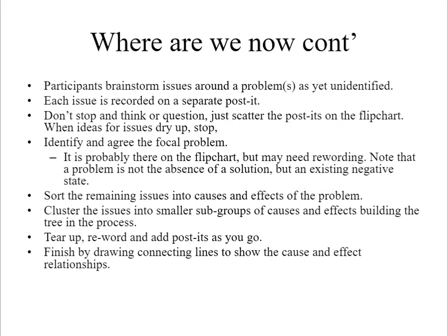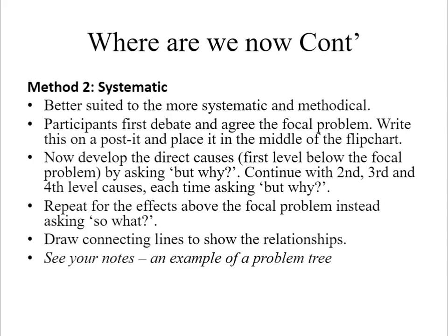After the focal problem has been identified, sort the remaining issues into causes and effects of the problem. Then cluster the issues into smaller subgroups of causes and effects, building the tree in the process. Tear up, reword, and add post-its as you proceed. You can finish by drawing connecting lines to show the cause and effect relationships.